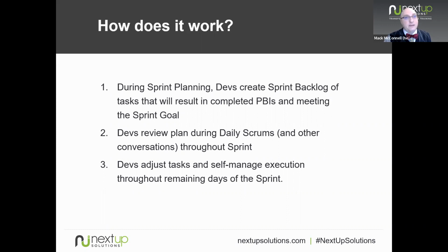And the points at that point, or the t-shirt sizes or the complexity size, whatever estimating method we're using, don't really matter anymore. It's just a question of, do we as a team still think we can get all of these things done in the sprint? And if not, we should go quickly have a conversation with our product owner to make sure we all agree about, if we have to leave one of these things unfinished, what's the least bad thing to leave unfinished?